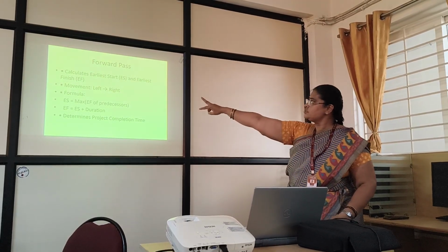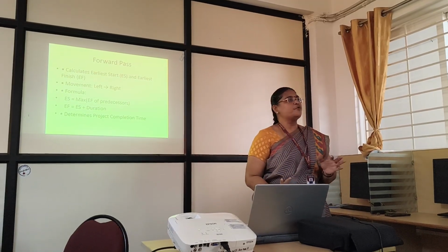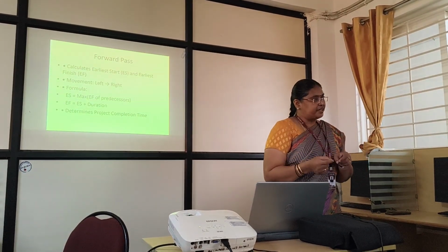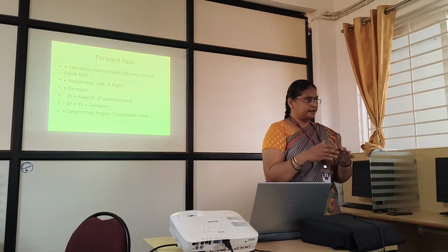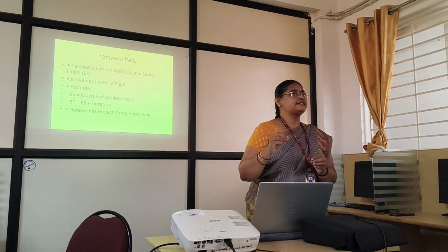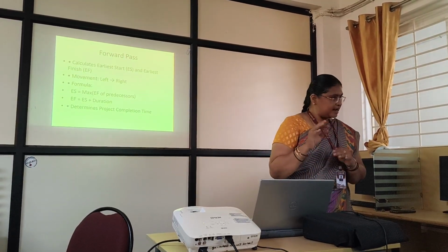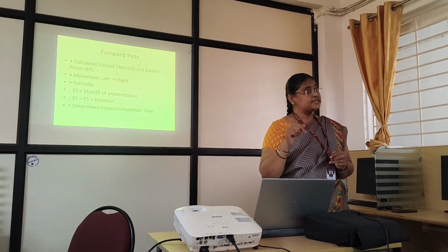The same way, we are going to calculate the earliest start, which is nothing but the maximum of the corresponding earliest finish of the predecessors. What is a predecessor? Predecessor means, for example, I am writing the numbers 5, 6, 10, 11, 12. What is the predecessor of 12?